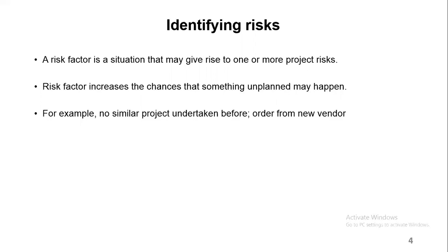And then it turns out that supplier was not giving you accurate information. He was just doing marketing so he can get you. Now the thing will end up getting delayed. But if you work with someone you have been working with, you are more likely to be confident about by when they will supply you with it.